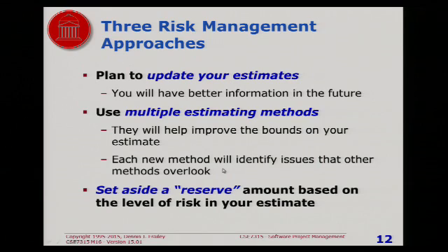The second method of managing risk is to use more than one estimating method. That is because when you use more than one method, it gives you a better understanding of what the truth probably is.